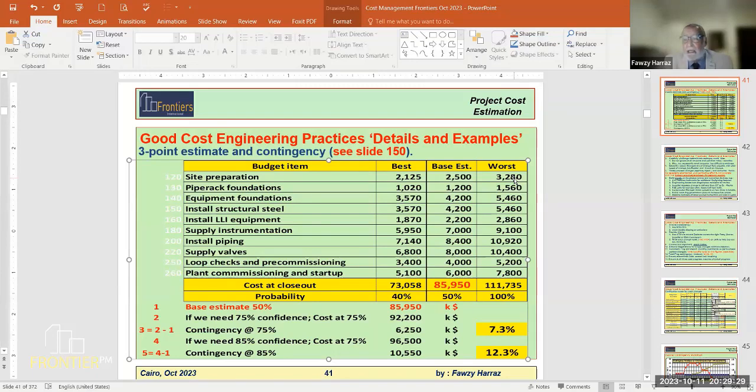Now forget that you are an architect for a moment. You go to a process or power project. The FEED estimate develops quite detailed designs to make good quantities and clear specifications. And the idea is to arrive at a credible estimate, like you said earlier. The owner makes his internal estimate based on this, and the bidders are requested to quote lump sum.